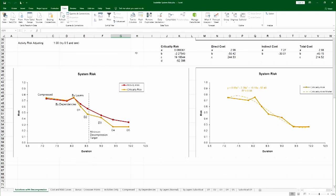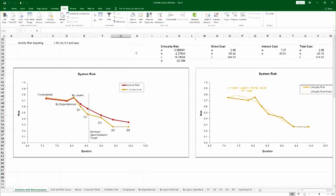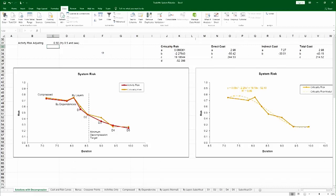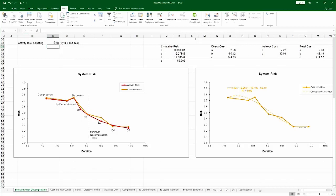Now, you can actually correct it by replacing every outlying float with the standard deviation, the average plus one standard deviation. That's in fact already done in this curve and it's still not a perfect match. You can actually replace it with a tighter range, one standard deviation by half a standard deviation. Let me replace that. And you can see then it's a perfect match.